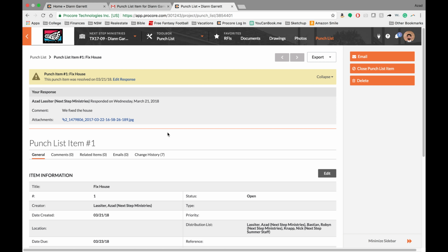So from this point, if you fulfilled the punch list, your job is done. Now it goes back to the punch list manager or whoever created the punch list. It is their job to say whether you have done the correct work or not. And so from here, they can reject your punch list, send it back to you, or they can say, okay, we're going to confirm this punch list is done, and they can close out the punch list item. And if you happen to be the person doing that, you can hit close punch list item.